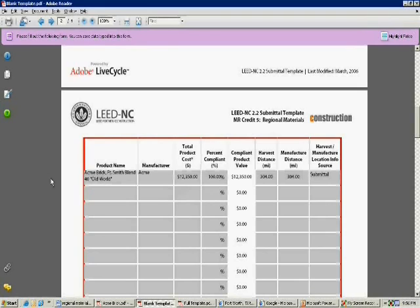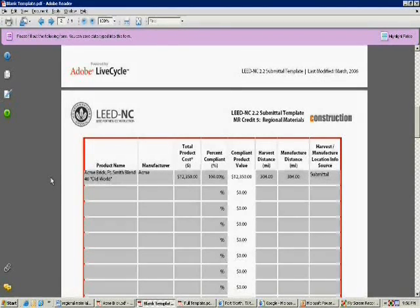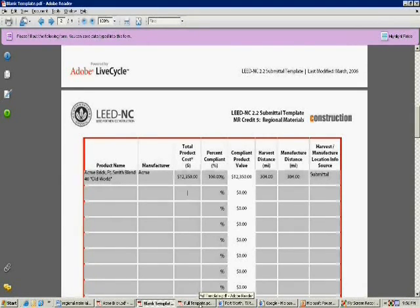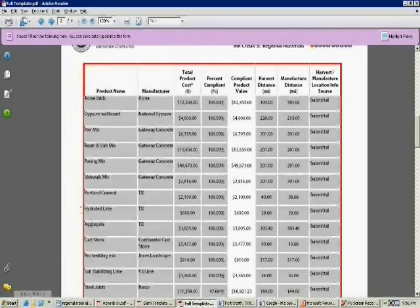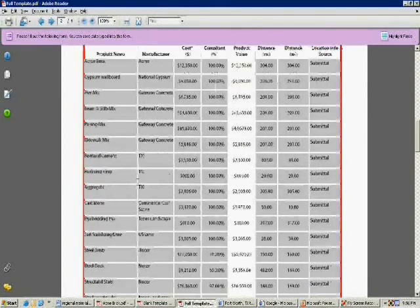I repeat these steps for every piece of material that went into my project, and all the material that's within 500 miles of my project site I get to claim as regional and put it on the submittal template. Here's an example of a filled out submittal template that has all the material that was within 500 miles of my project site.